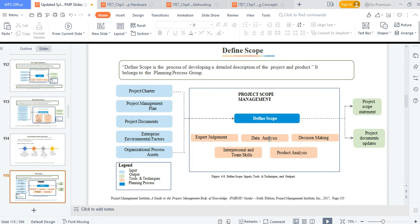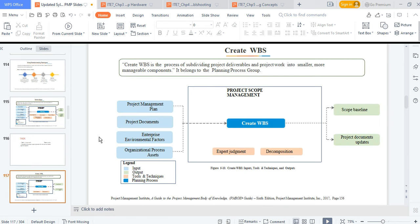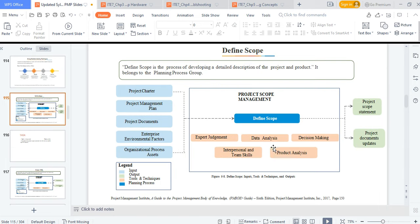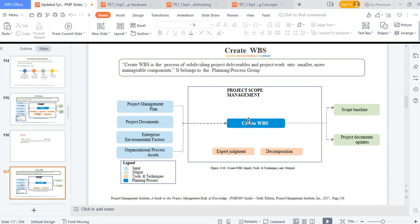For defining scope you also use data analysis and product analysis — today we compared different banking products and created something that makes sense. Decision making was needed on how the software should operate, along with interpersonal and team skills. Work breakdown structure (WBS) means dividing a task into small parts. For instance, I've done one part, created the WhatsApp group for project support, sent another part to another staff member, and a third staff member is responsible for testing — I've decomposed this task after today's meeting.